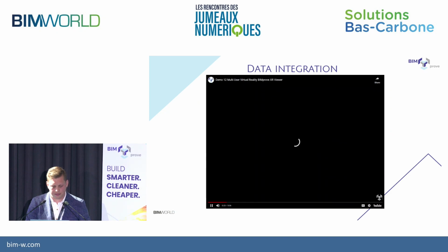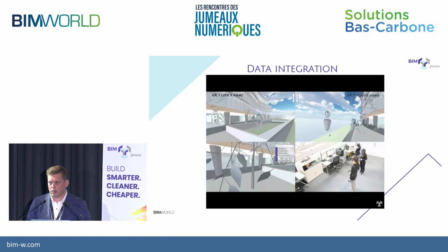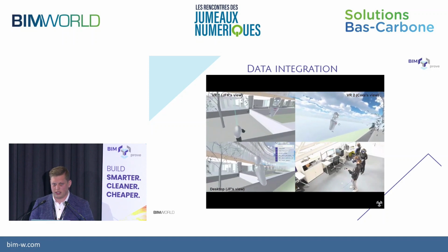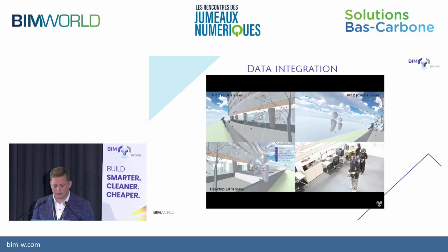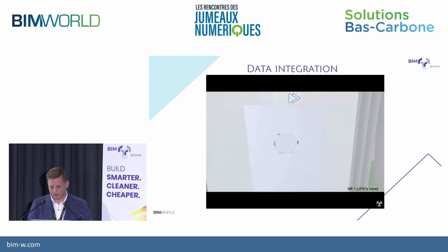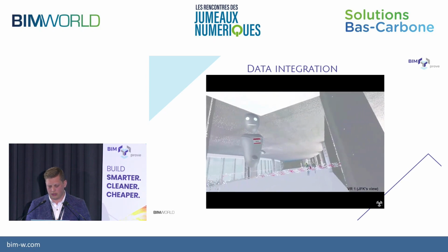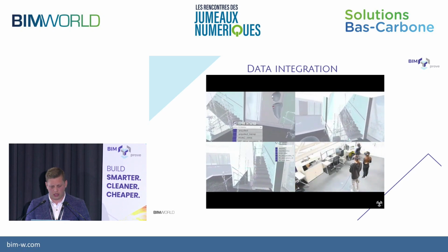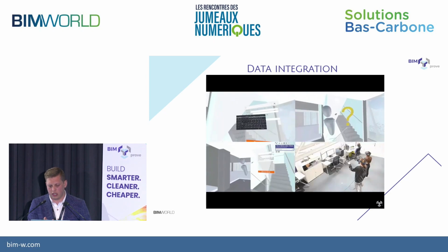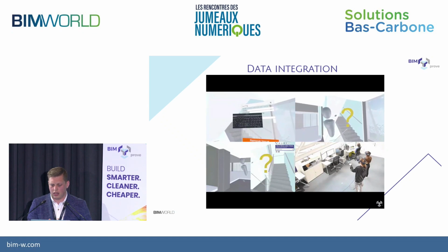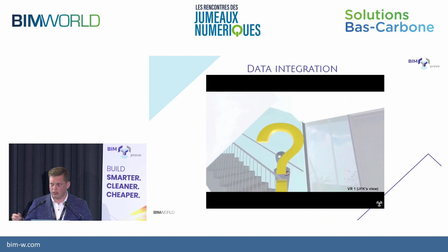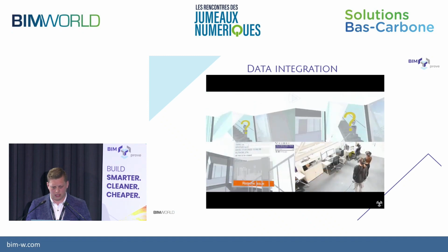And here is how this combined knowledge might also be used in VR. We have three participants checking our construction site, which in this particular case is in Madrid. So instead of going directly to the construction site, you may perform the whole check from the construction office. We see our colleagues going onto a floor and checking if everything is in place. We see the point cloud included in this model, and for example there is some railing missing here, so we can create a BCF and connect it with our workers in a particular zone and notify them that there is a new task to do in this space.